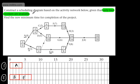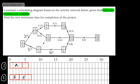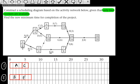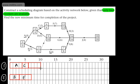At this stage Worker 1 has completed activity A, so we need to allocate them a new activity. I have a choice of C or D — both depend on the completion of A. We choose the one with the lowest late event time, i.e., the most critical, which is C. So we allocate C to Worker 1 and mark it off. Worker 1 then becomes ready again, and we consider activity D. Activity D also has a lower late event time, so we go ahead and allocate D to Worker 1. Activity D depends only on the completion of A, and we add it to the diagram.